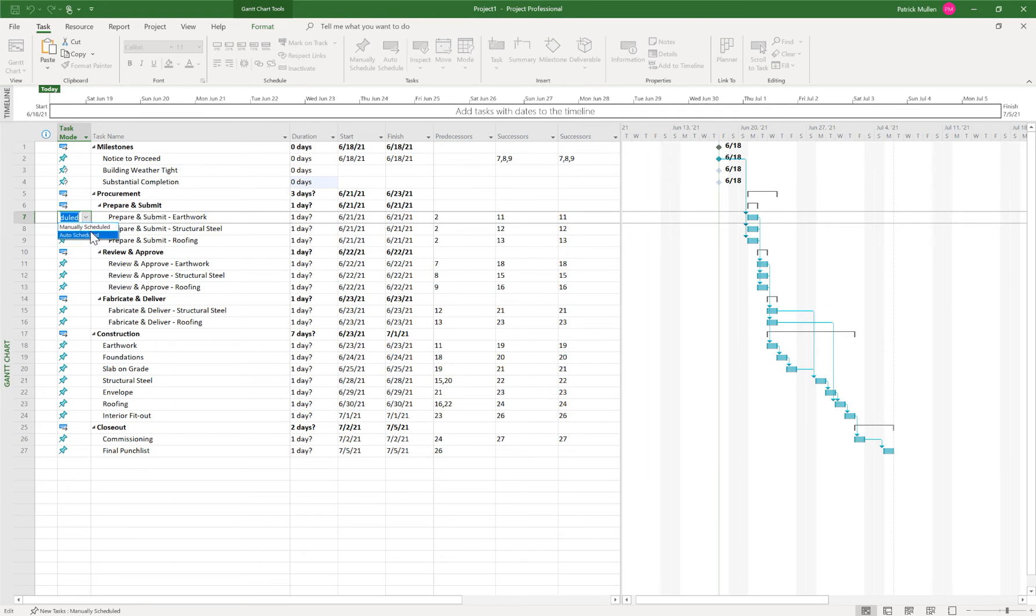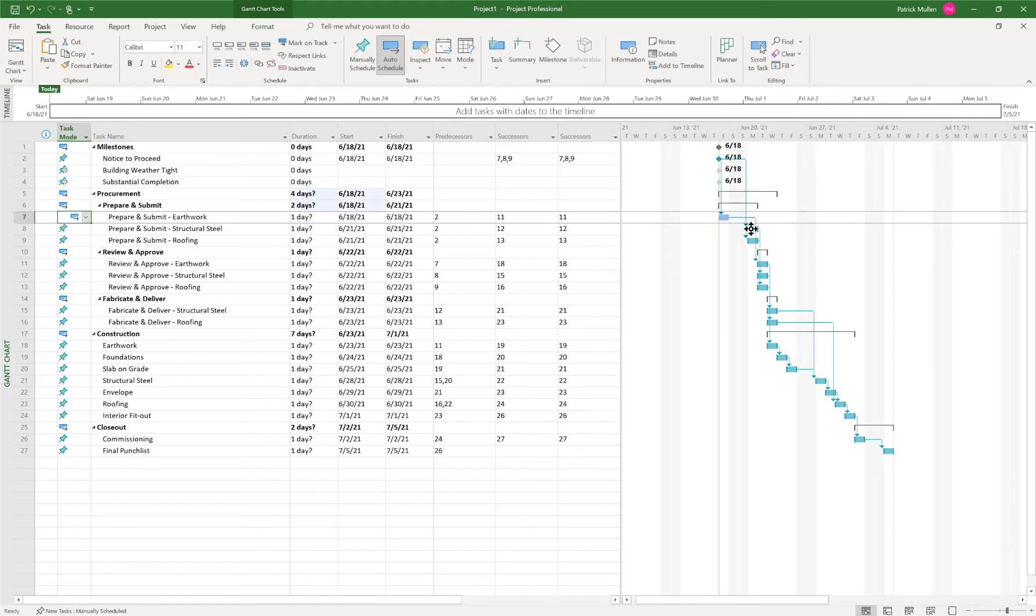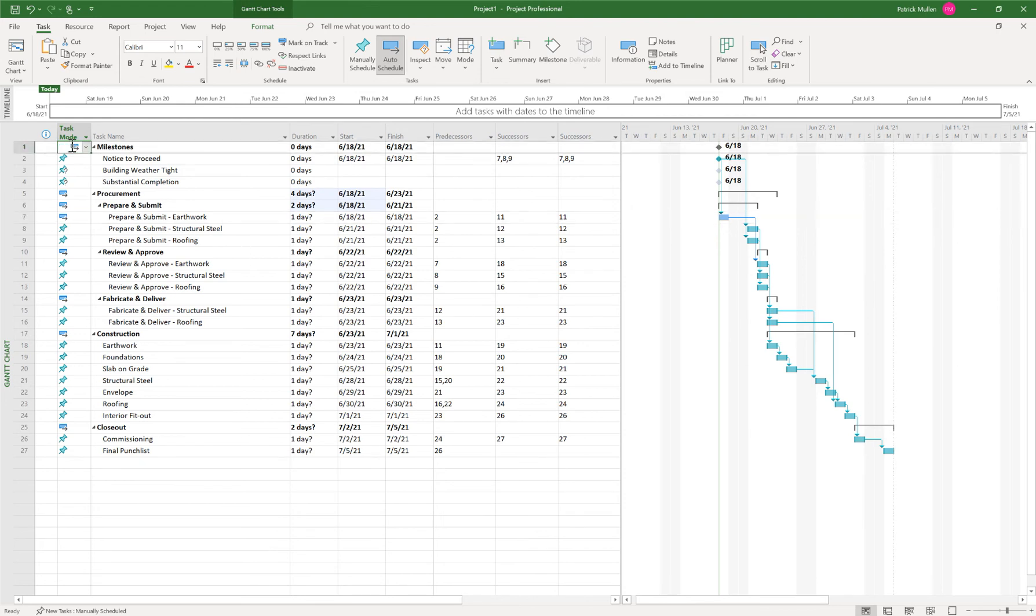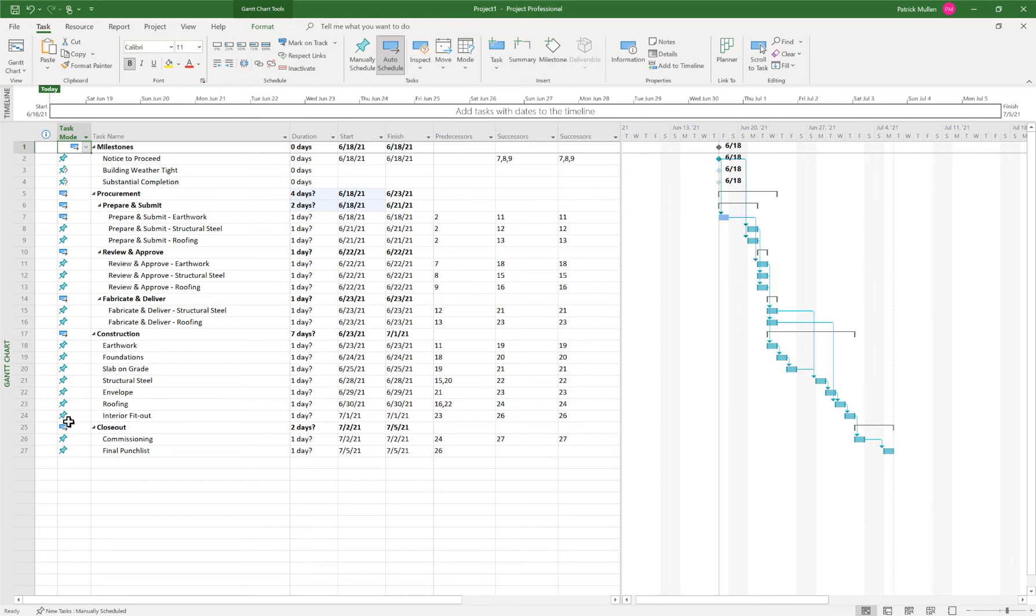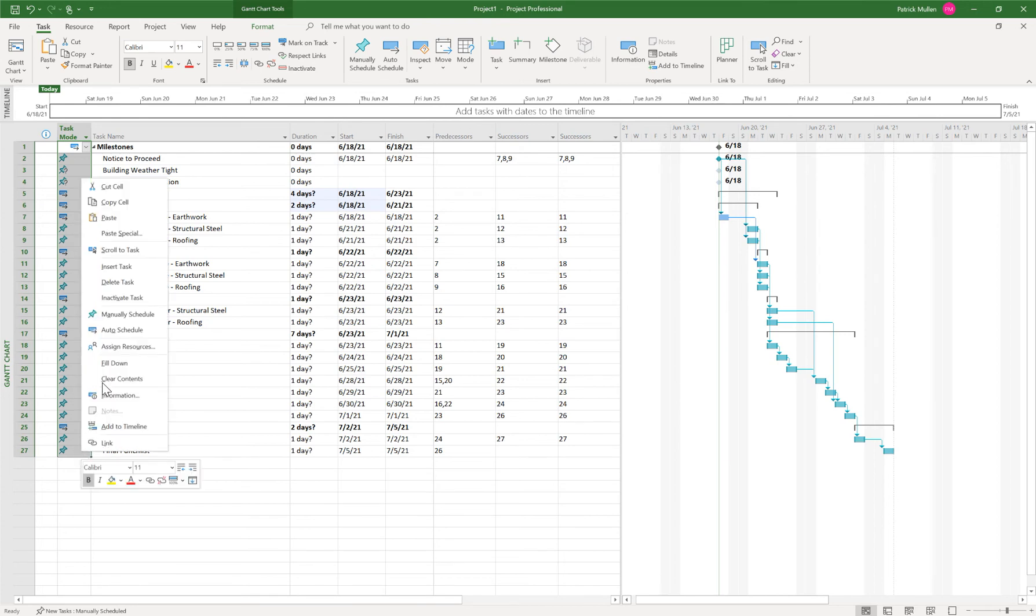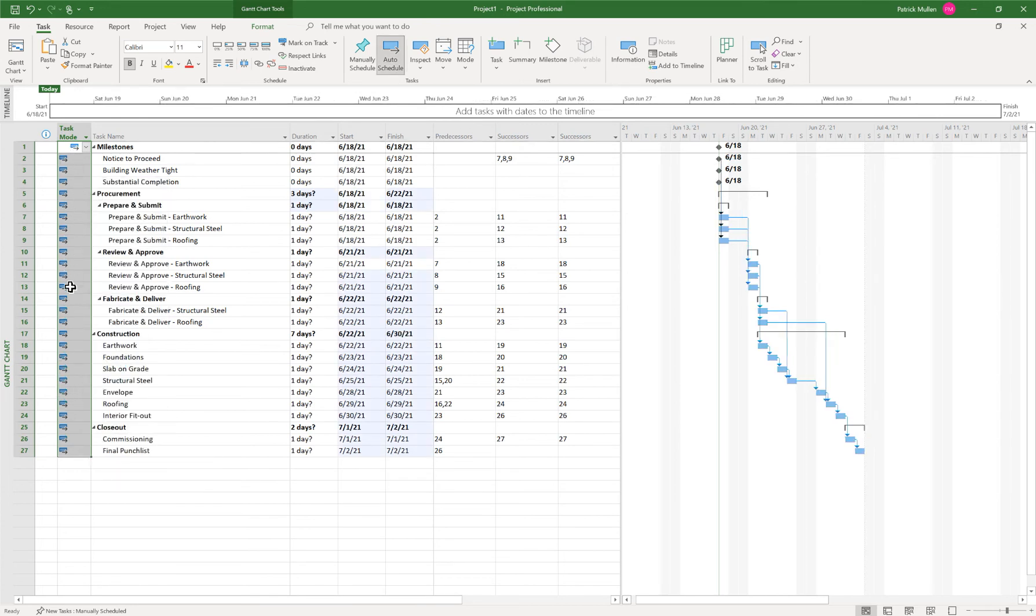You have two options in project. You can manually schedule tasks, which is really just holding the task in place according to the dates that you want, or auto-scheduled, which is dependent on the relationships that the activities have. So it's generally good scheduling practice to use auto-schedule according to the relationships of the activities. So if you click on the top activity and you say auto-schedule, and then you highlight all of those task modes, and then you can just fill down and that's the quick way of changing all of those tasks into auto-scheduled. And you'll notice that it changed all these as well.